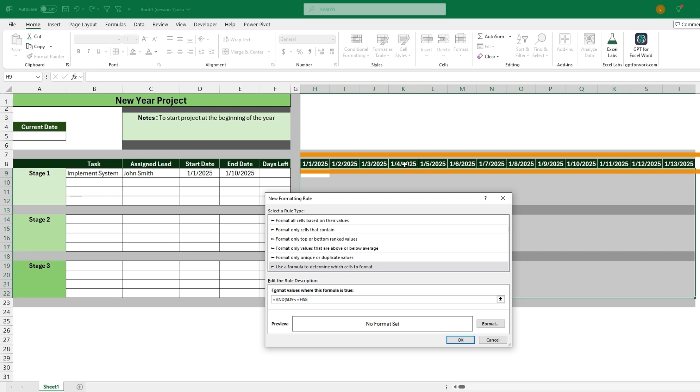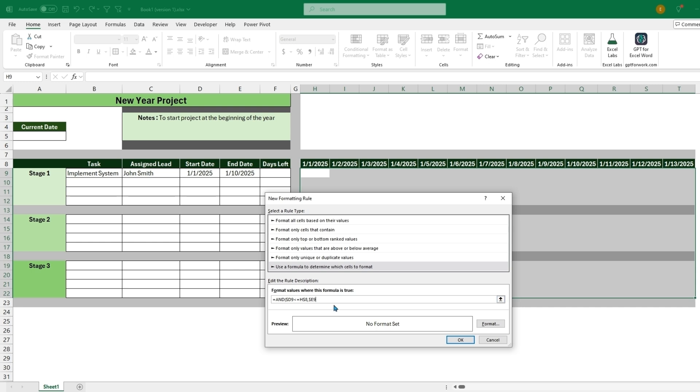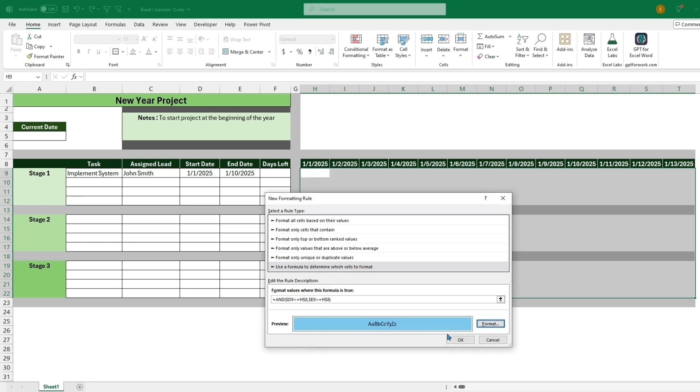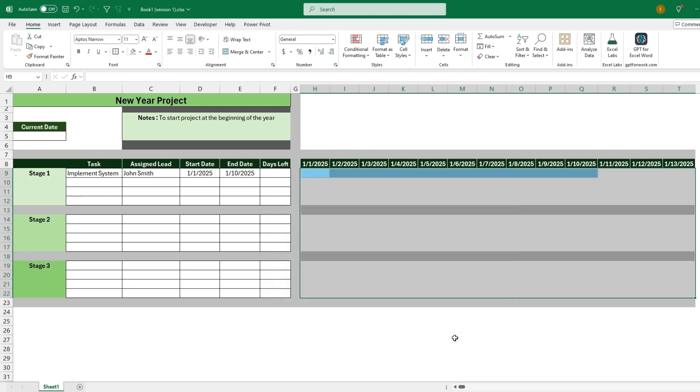Since that's our first date, but we want it to stay in row eight, but move along these columns. So to I, then J, K, and so on. So then we can put a comma here, starting our next condition. So now our next condition can check if this end date, getting rid of the dollar sign at the nine, is greater than or equal to this date in H8 and get rid of the dollar sign or the fixed value before the H. So we can close this parenthesis, and then we'll want to click format. And in the fill section or the fill tab, we can now pick a color. So we could pick a light blue in this case, click OK and click OK again.